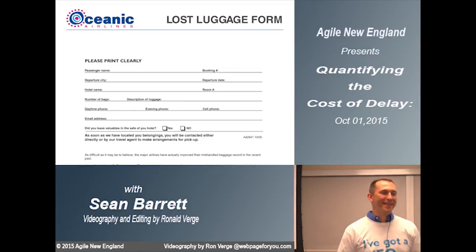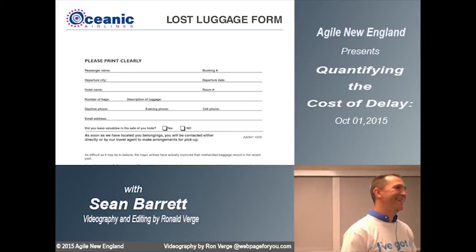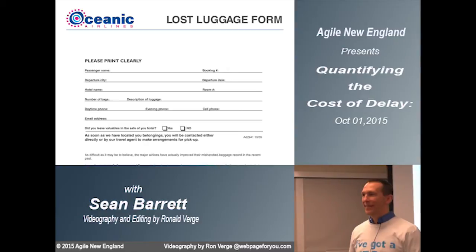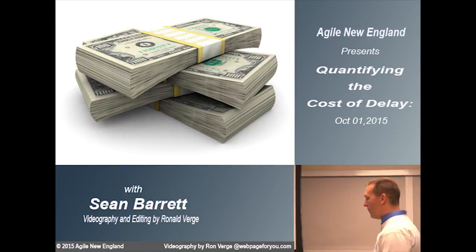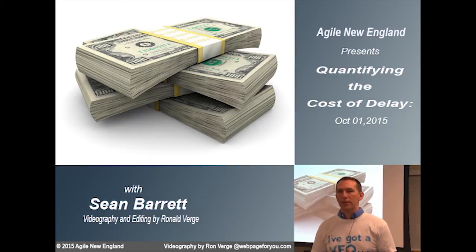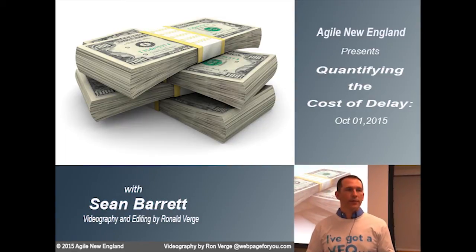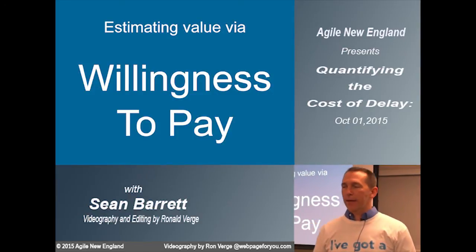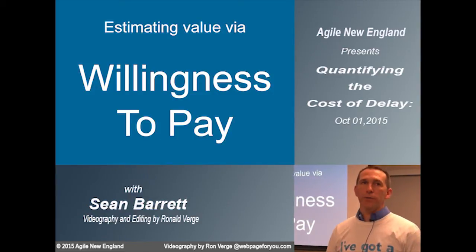Priceless. We hear that a lot. I would give anything I had to have that thing that I really needed, say a satellite phone. Okay? So, thinking about how much we would pay for something, a willingness to pay, is one technique we can use to put an actual dollar value on something that might otherwise feel pretty intangible. So, estimating value by willingness to pay, just one tool in that set.